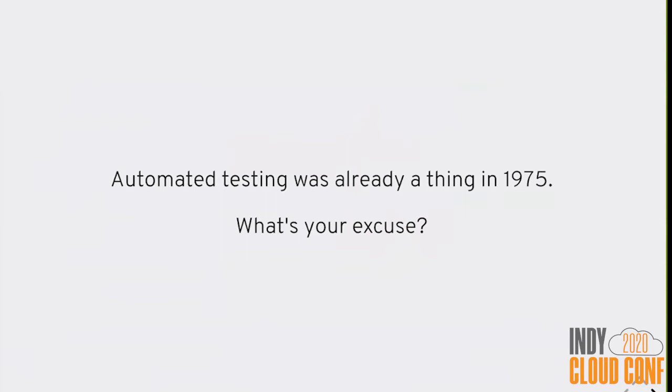Footnote: it's not that doing tests takes 3 times as long. Finding all of the bugs that testing will find for you, fixing all the bugs that testing finds for you, is what takes 3 times as long. The bugs are already there. Testing is what lets you find them and fix them.